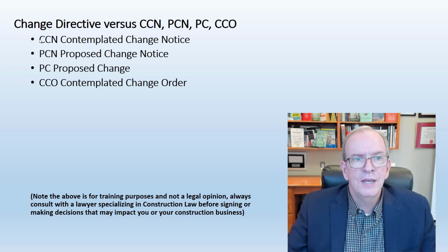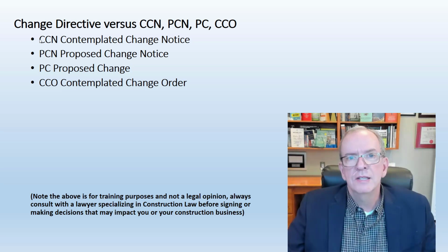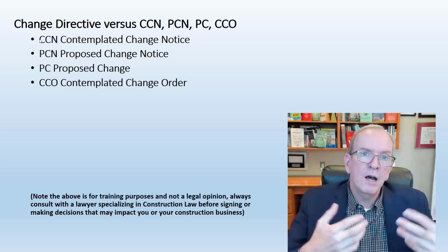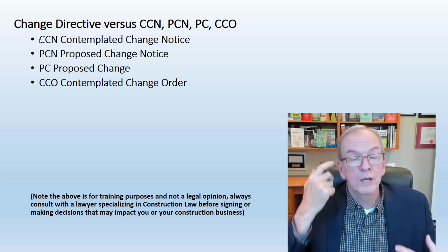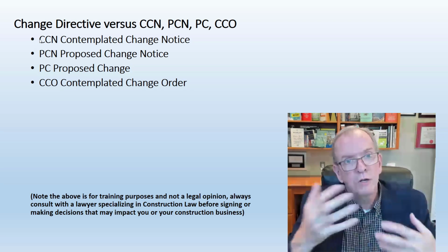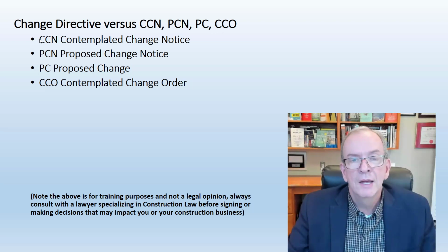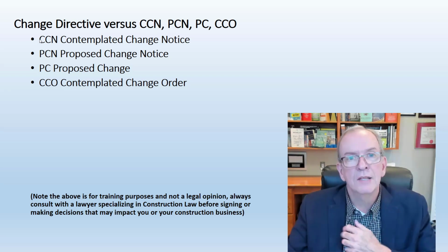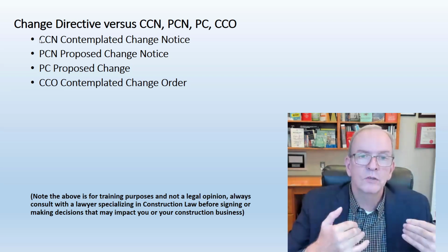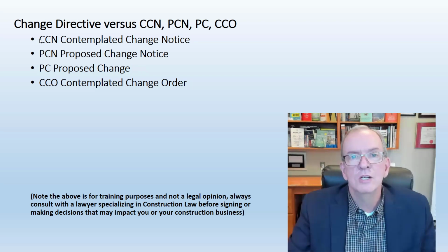If we're excavating and we come across a condition that we didn't expect, we may have an RFI, a request for information or a request for interpretation. We're just looking at that at this stage, but we want some information back. We may determine very clearly that this is not part of the contract, and so then we go with the consultant, maybe proceeding with a change directive to keep the excavation moving for now.